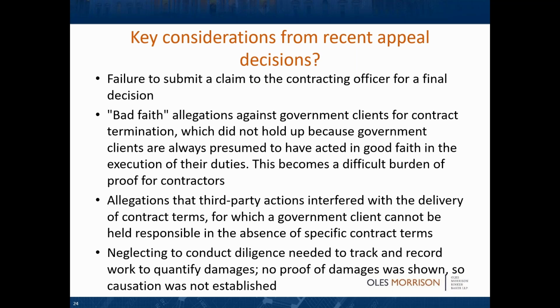There is something known as natural growth, for example with a lumber contract, where you can show that there's a continuing impact, so the number will go up. You always want to assert, right now our sum certain is $500,000, but it continues to grow with natural growth. But be careful with the words you use, because of decisions that say anything that says approximately or up to is not a sum certain.